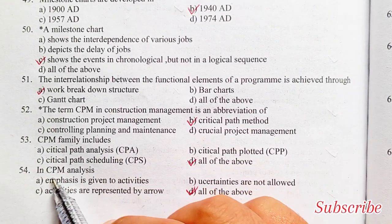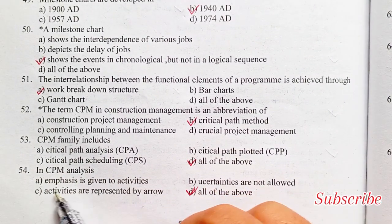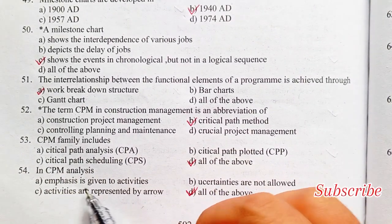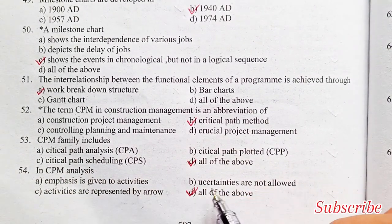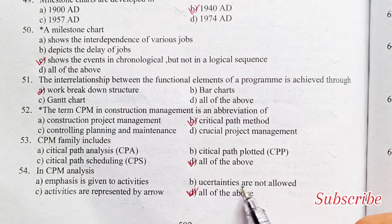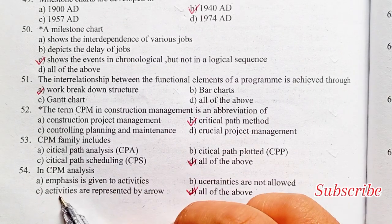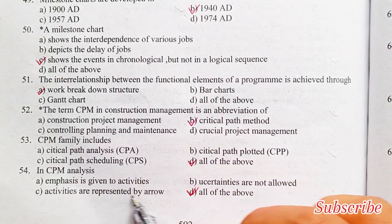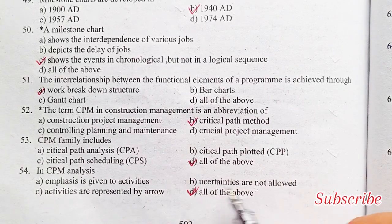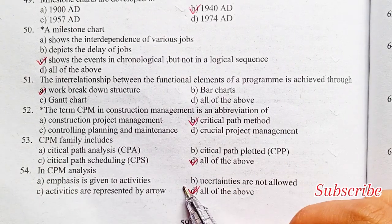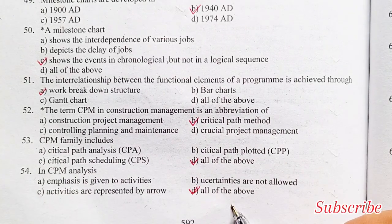In CPM critical path method analysis: importance is given to activities, uncertainties are not allowed, activities are represented by arrows, all of the above. Option D is the right answer — all of the above.